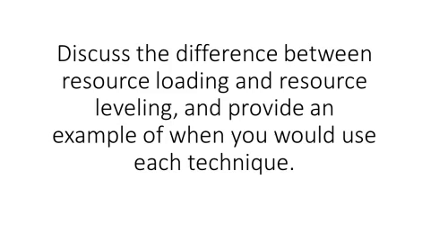Let's look at some of the other definitions. Resource loading refers to the amount of individual resources that exist in scheduling requirements during specific periods of time. Resource loading mainly involves organization, manpower, or employees. In resource loading, each employee is assigned a task as a percent of the project, usually 25%. The employee is assigned other tasks until he is at 100% workload. This would mean that the employee cannot take on any additional work.